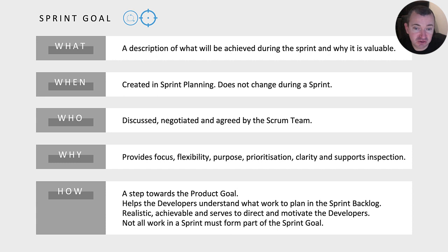If a Scrum team struggles to set a sprint goal, it may be a sign that the product goal is unclear. The Scrum team may struggle to deliver the high value items required under these circumstances. If the product is mature, the nature of the work may make sprint goals more difficult to create and less useful in practice. If the majority of the Scrum team's work is support and maintenance, then the goal can be clearly stated but may be of less benefit.